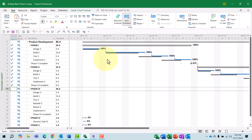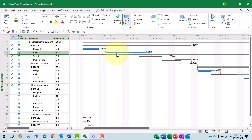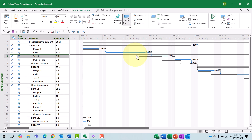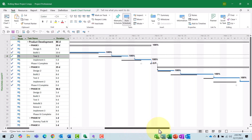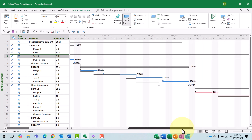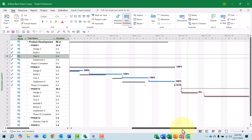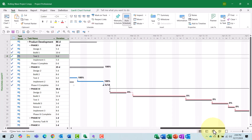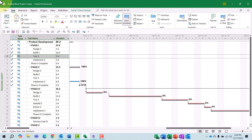Here's what I can see. In Phase 1, I can see that this task slipped and this task slipped further. The middle task was already slipping because Build 1 slipped, therefore Test 1 slipped, and Implement 1 slipped. Then I can see further in Phase 2 there's slippage as well. All of these tasks are dark blue because they represent completed tasks — they are no longer on the critical path. And in Phase 3, I can see all of these tasks have red Gantt bars representing critical tasks in the project.